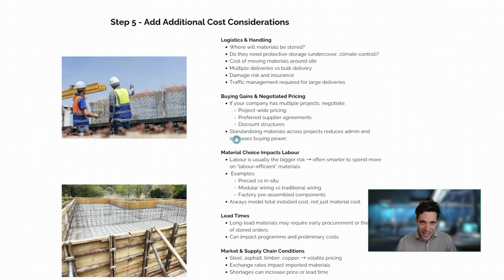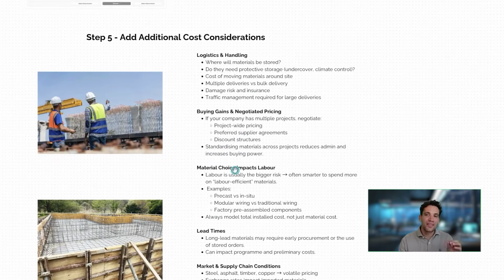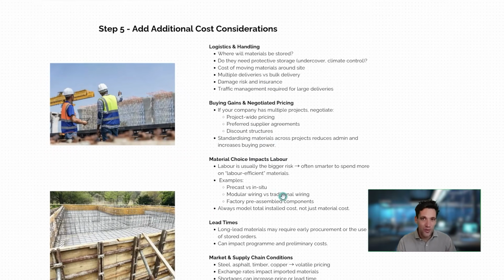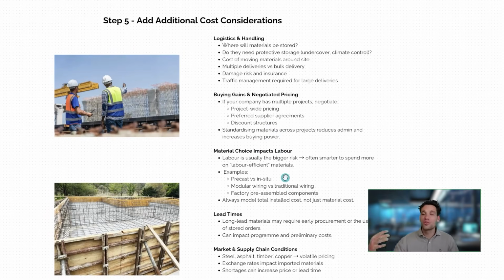Now, the other thing that is more of a strategy big companies use is if there are buying gains from group procurement policies, how are they factored into the project? Say, for example, you're a large civil construction project and your general manager or owner negotiates a deal with a steel reinforcement company that says they're committing to this huge volume of orders across a year or 2 years, and based on this quantity, they're getting discounted prices. How is that factored into your pricing?